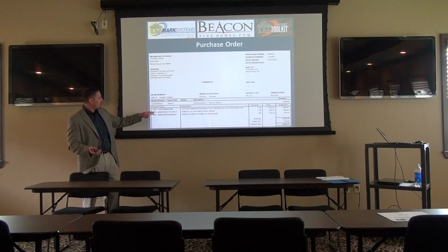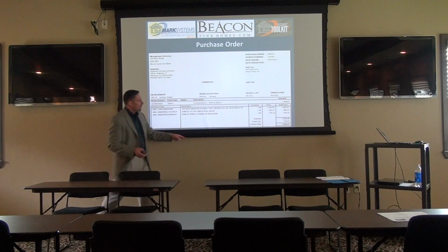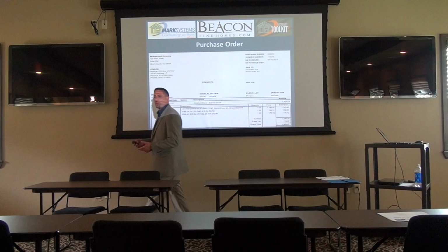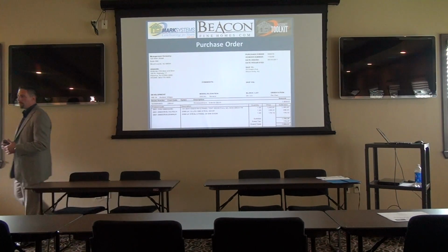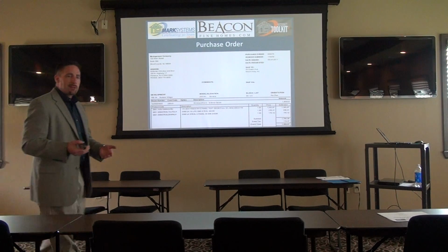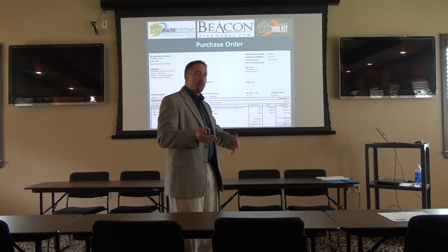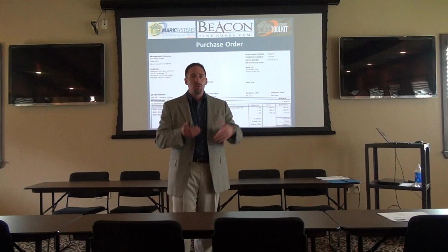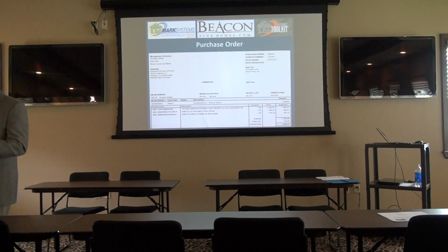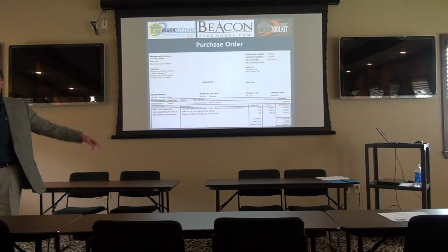So the purchase orders are going to tell you all the parts and pieces with the quantities, with the price. Okay, that's the real difference. The purchase orders give you the detailed breakout. If you're getting your own detailed breakout and you're giving a price that's lump sum, there's no need for the builder to then reiterate that breakout to you. You're getting the cheapest supplier, you're getting the best rate you can, and you're doing it to make your profit, and you're giving the builder a lump sum price. But that's not you. This is the supplier's breakout.